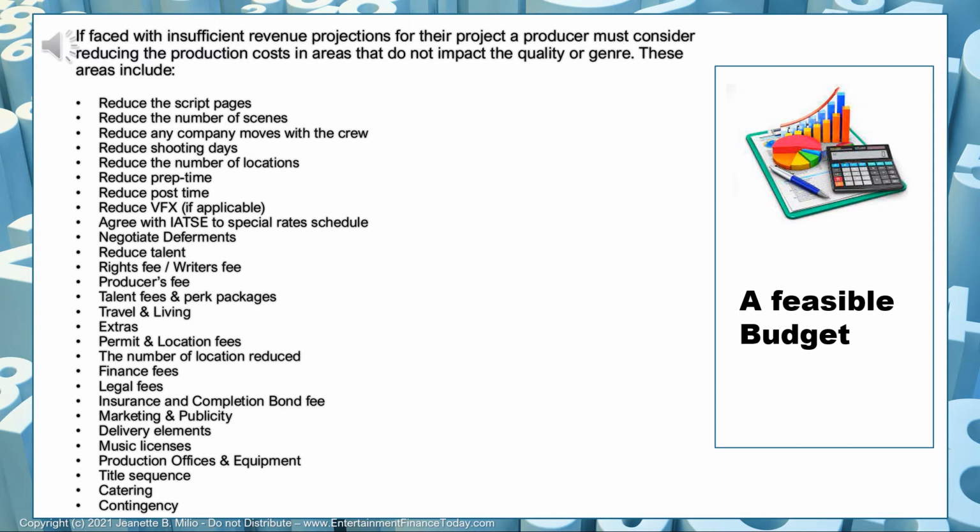Producer's fees is obviously a biggie. For you, the producer fee should be at a certain level. I would always suggest kind of the 5% range. But you're not going to be the only producer on the movie, very likely. So you need to think very long and hard about who you're paying a producer fee and what they're really bringing to the table. And is that fee really related to what they're bringing to the table, or is it maybe too much?